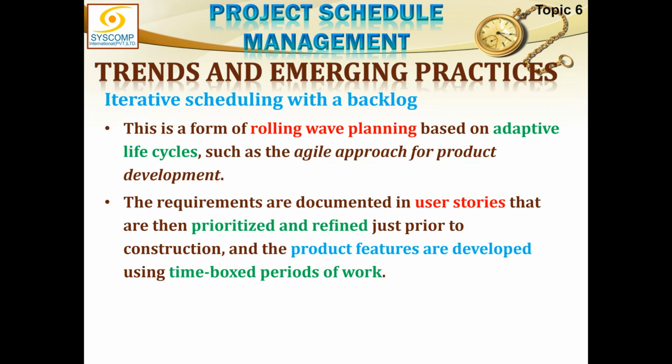Remaining items lying in the product backlog are open to change. This time box is very small, maybe 2 weeks, 3 weeks, or 4 weeks. So we only pick up the work which we could do in 4 weeks, and the remaining 11 months of work is open to change. The customer can anytime change anything.